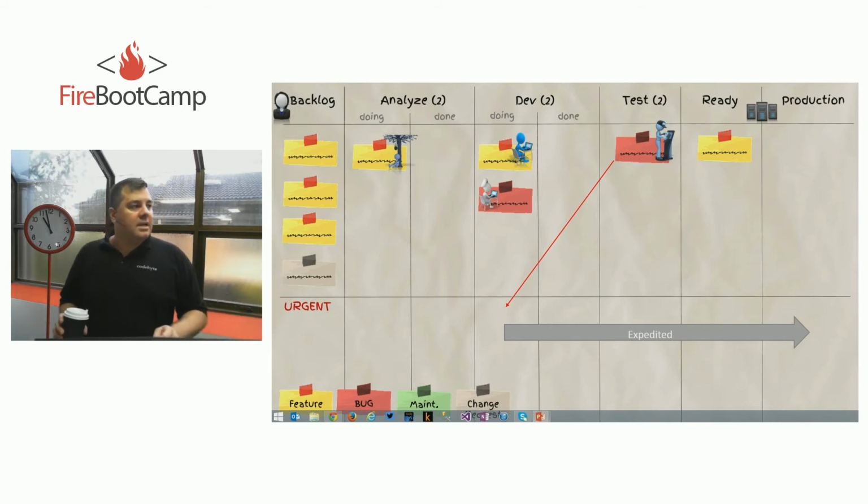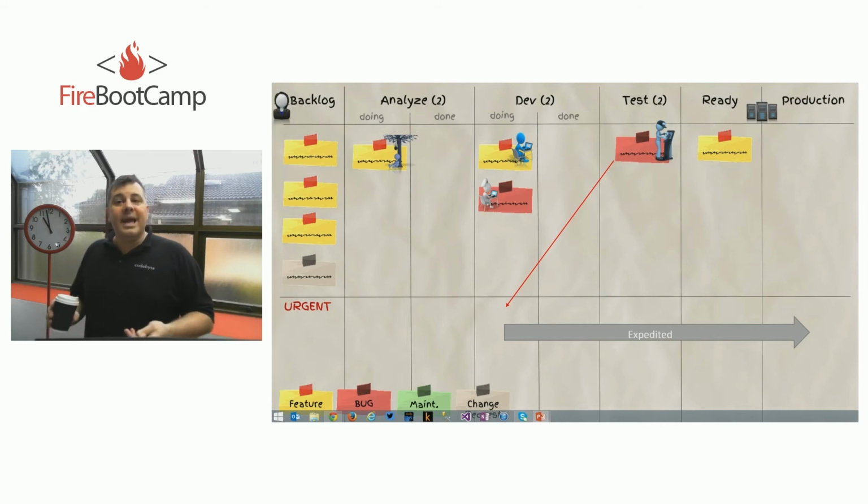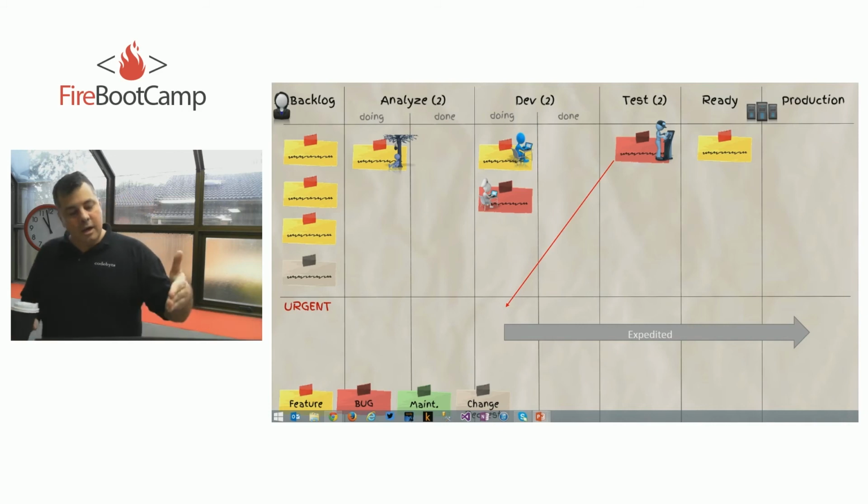One of the things that you may want to decide is no bug goes unchecked. You want 0 defects in your product. So if you find a bug, you do not want to put it to production, or put it to your backlog again, because while you're fresh, it's easier to work on these things. So in our case, we put it immediately to our urgent swim lane, and from there on, it's actually expedited.